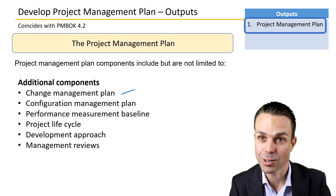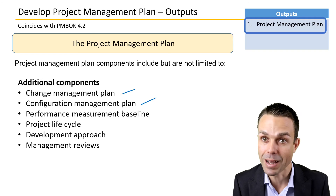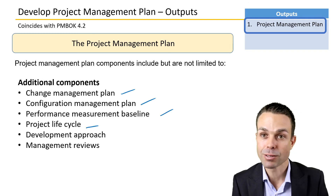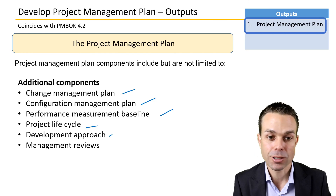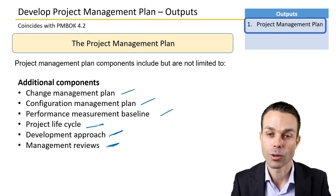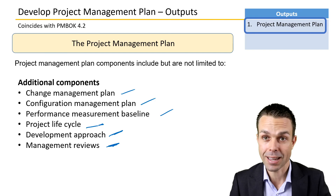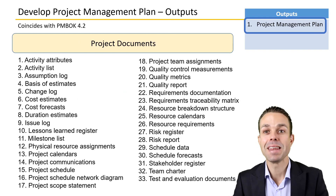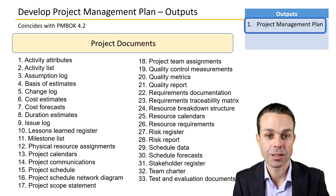Additional components that might go into the project management plan include the change management plan, configuration management plan — which documents will be baselined — the performance measurement baseline, the project life cycle (whether agile or waterfall), the development approach, and management reviews covering how we review different milestones to make sure we're getting what we want as the project progresses.